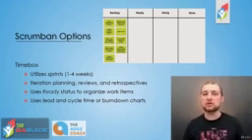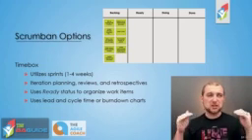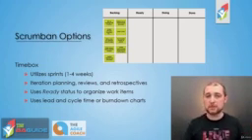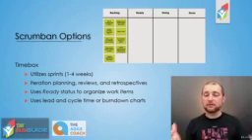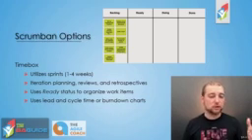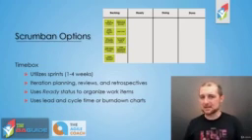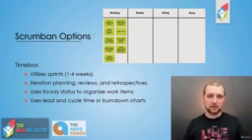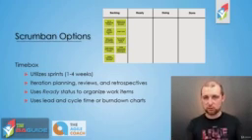And as I alluded to, in the time-box Scrumban, you are doing some of those Scrum type of structured meetings. You have your sprint planning meeting where you're going in, defining what you're committing to for that particular sprint. You have your sprint reviews where you're discussing how you guys performed in that sprint. Were there things that you were expecting to get done that you didn't get done? How did things work out compared to your estimates? That type of thing. You're reviewing the sprint overall and discussing how things went.